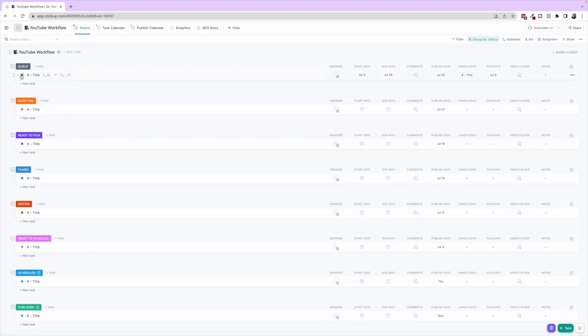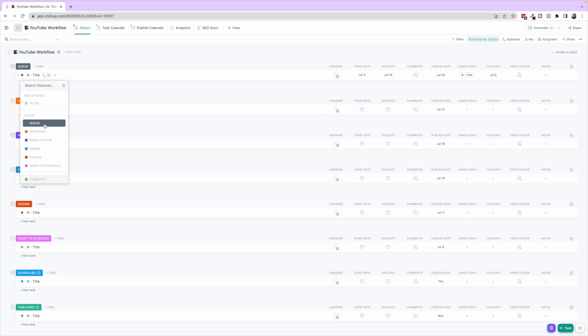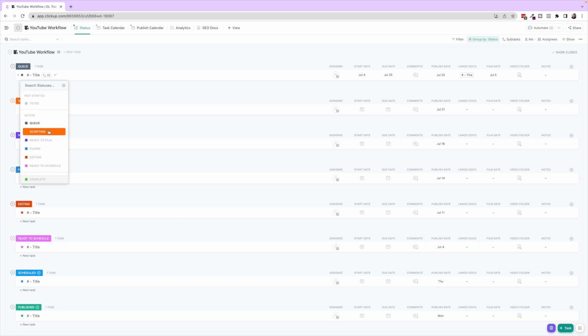The statuses we have here are Queue, meaning these are videos that we are going to put into production but we haven't started developing them yet at all. We can put them on the calendar or even just put them in Queue like okay, we're gonna make this, we just don't have a plan for it yet. Move it into Scripting when you start really developing it, writing the script, bringing in those assets.